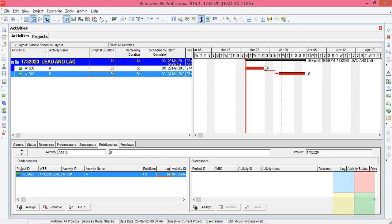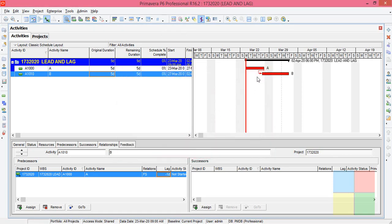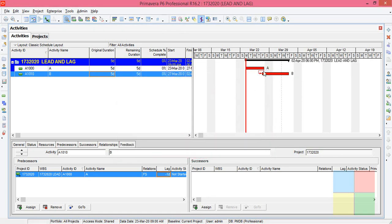So this is about lag. So what is lead now? As you see a lag column, you won't see a lead column. Lead is just inputting a minus value here. So if I input something like minus one and update it, the activity is overlapping by one day.